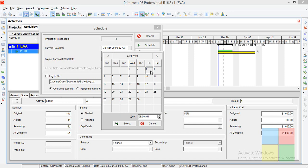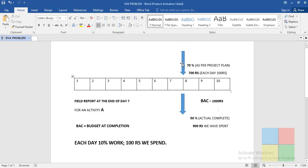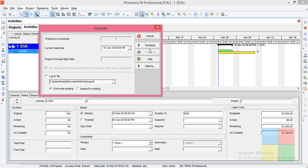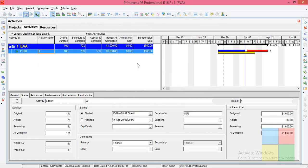Per day 10 percent, so for 50 percent we need to consider five days — but in the problem we need to get to the end of the 7th day, meaning there is a two-day delay. You can't add the 4th and 5th because they are non-working days. Now come to the 6th and 7th — at the end of the 7th day we are finishing 50 percent of work. The activity starts on 30 March, finishing 50 percent on the 7th day — select the 7th and make it 6 PM. Then select Schedule.